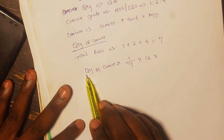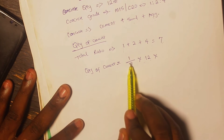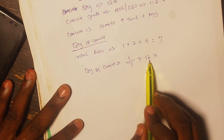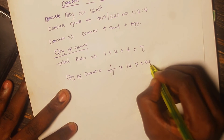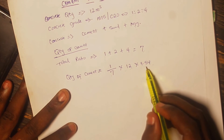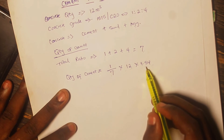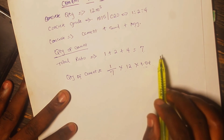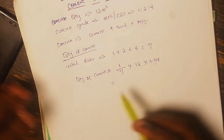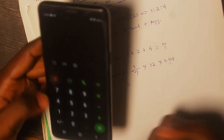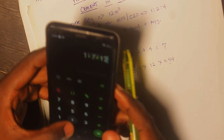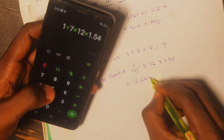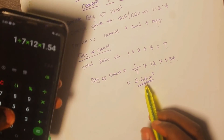That is why, when calculating the quantity of cement, this is the portion of cement over the total portion of the concrete constituents, multiplied by the volume of the concrete which is 12 cubic meters, then multiplied by the adjustment of 1.54. Just know that this 1.54 is a constant — you apply it when calculating for cement, for sand, and for aggregate as well. When we do this calculation: 1 divided by 7, multiplied by 12, multiplied by 1.54, that gives us 2.64 cubic meters. So 2.64 cubic meters is the quantity of cement.